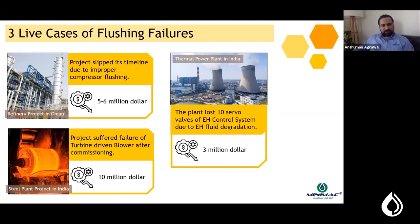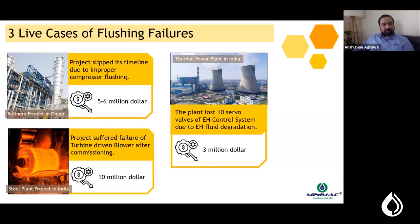The first live case is a refinery in Oman where the project flipped its timeline because of improper compressor flushing. The impact of that slippage was around five to six million dollars to the EPC company and to the operating organization.